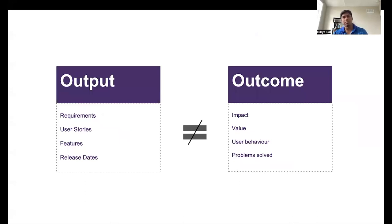We need to get out of it. And the bigger problem here is talking in outputs. So outputs are the what. They are the tasks, the to-do lists, the features, stories, launch dates, you name it. On the other hand, outcomes are the problems to be solved, the value created, and the why behind it all. Now, the problem is teams often get lost in planning for the what, which is the output, and lose sight of the why, which is the outcome. And features are actually outputs. The goal of any feature you ship to a customer should be to change the customer's behavior in a positive way, in a measurable way. If you ship a feature, and it doesn't have the desired outcome, then we would say we haven't done the job right. To shift the perspective, we need to build our roadmaps around problems we are solving, around capabilities we want to unlock, and the user behavior we hope to change.